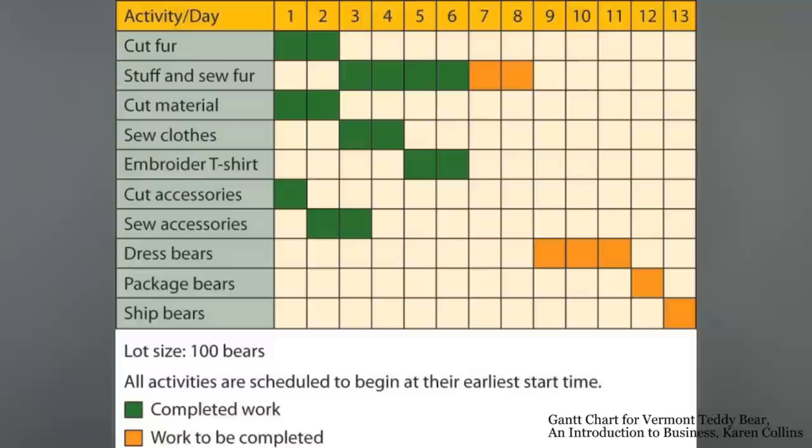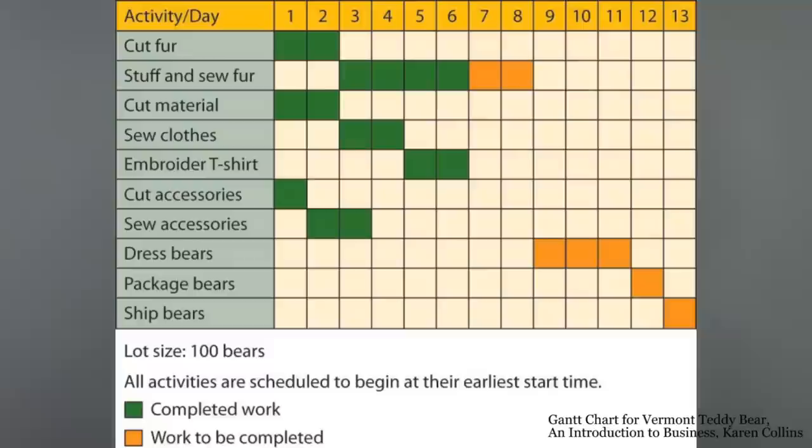Let's take teddy bears as an example. You can't ship it off before stuffing the toy's fur or dressing it — there's a clear progression of events. This Gantt chart shows the progress of how to build a Vermont teddy bear, as described by Karen Collins.